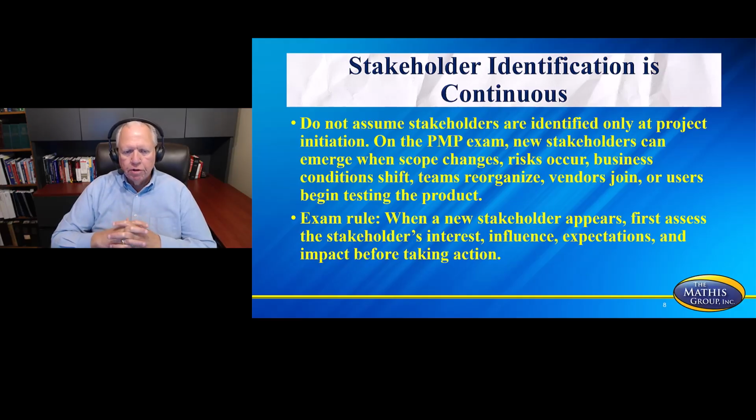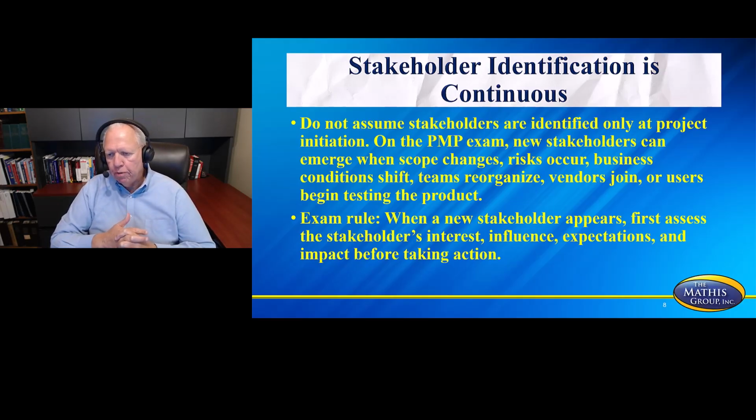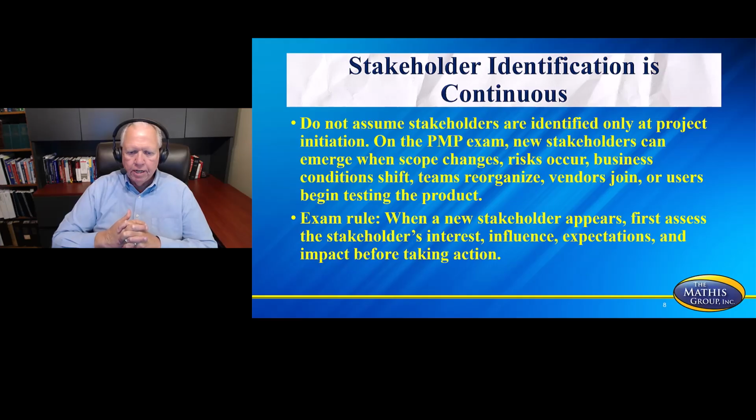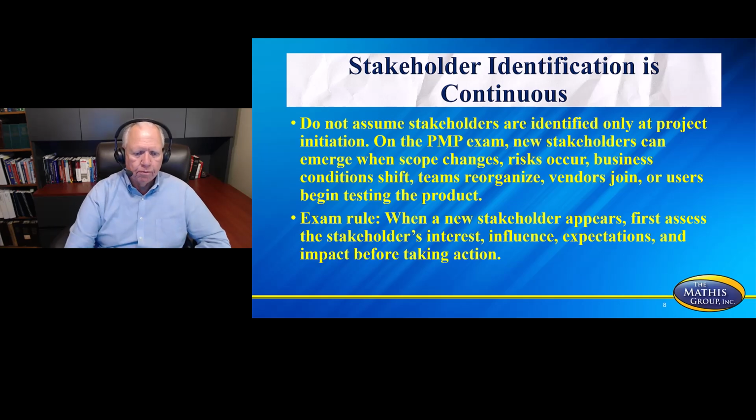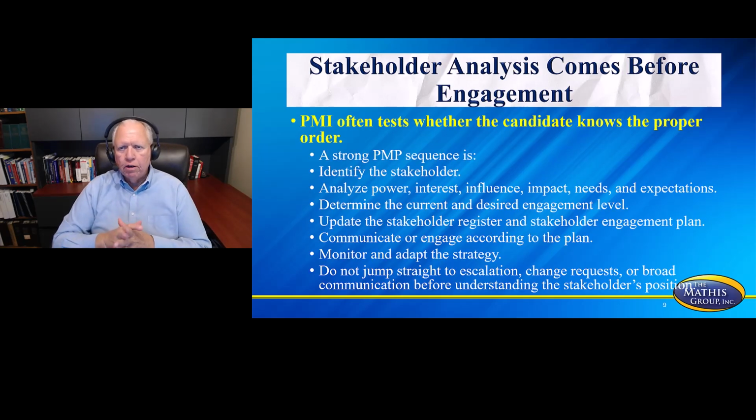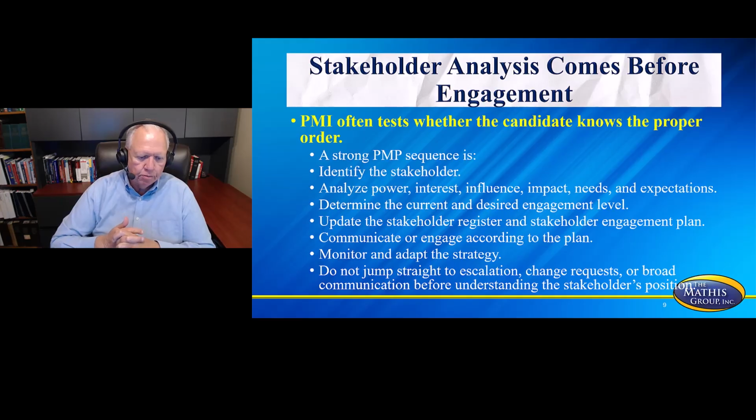The exam rule to keep in mind is when a new stakeholder appears, first assess the stakeholder's interest, influence, expectations, and impact before taking any action. So one of the challenges people have so many times, a new stakeholder shows up and we start trying to escalate or we start trying to engage them in so many other ways, and we haven't even done the first thing, which is assessing that stakeholder up front. Stakeholder analysis comes before engagement. So PMI often tests whether the candidate knows the proper order.